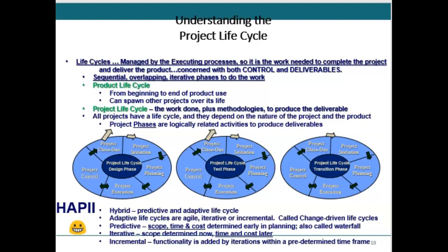That might include things like training or transition requirements, etc. And then at the gate check, because you're done with your project, you will get customer sign off in the validate scope process. So the customer will attest in writing, whether they're internal or external, that they accept your deliverable.